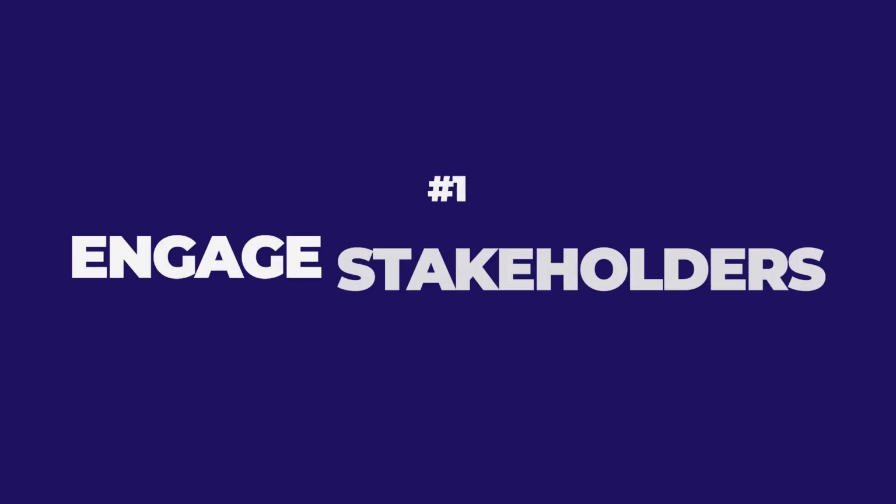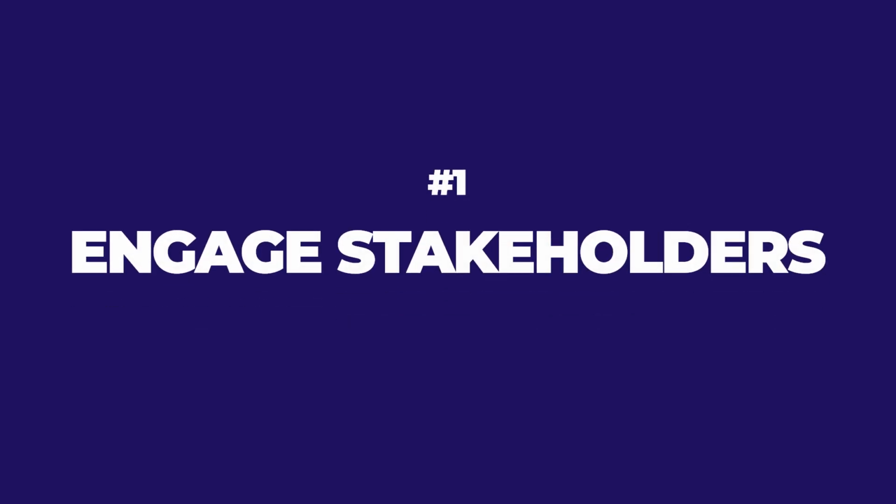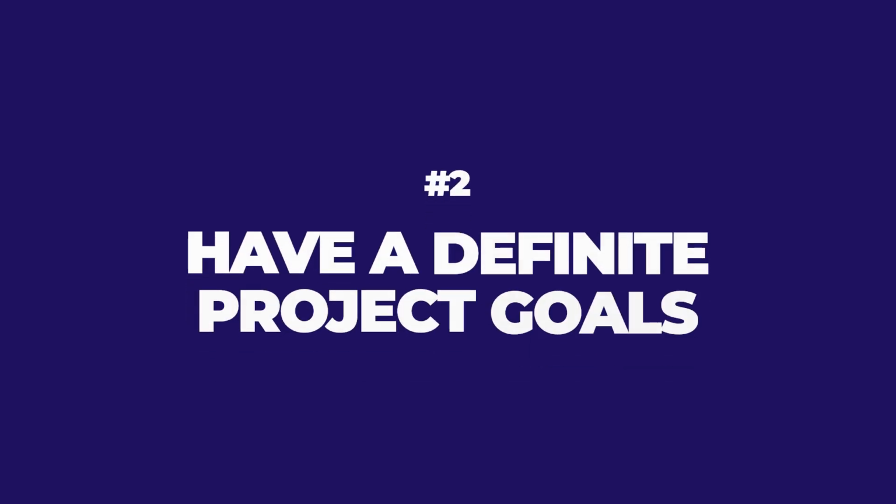Number 1, engage stakeholders. Stakeholders are your owner, your design team, your engineers, your end users, anybody with the facilities management, your trade partners, your vendors, your general contractor. Get with your stakeholders and get some early input on what the conditions of satisfaction for that project will be, and set them and write them down.